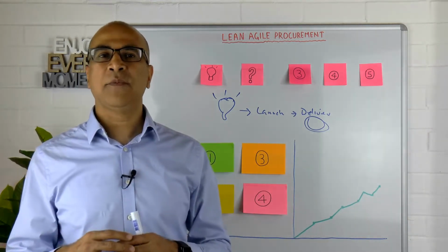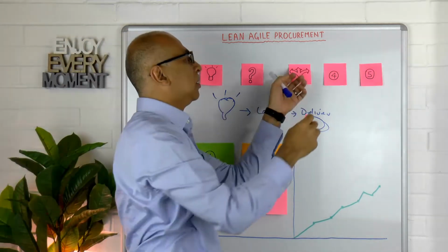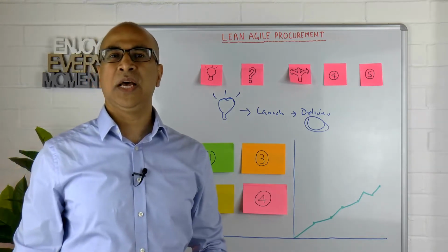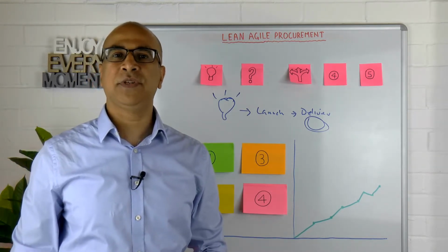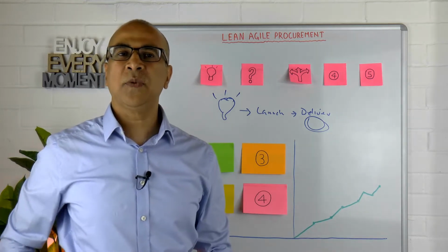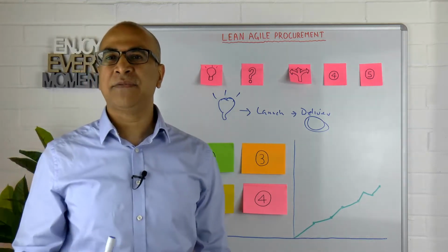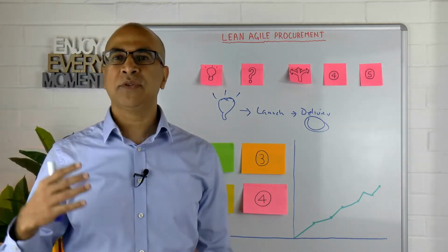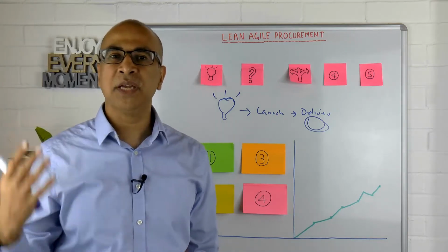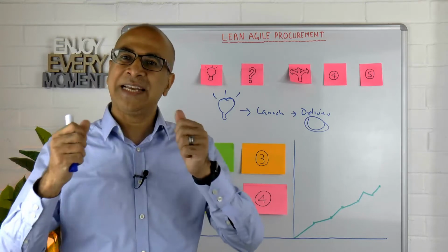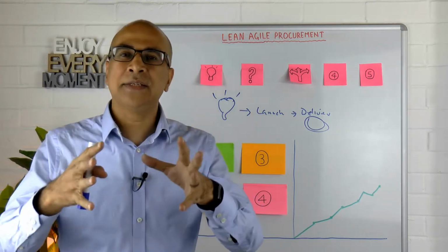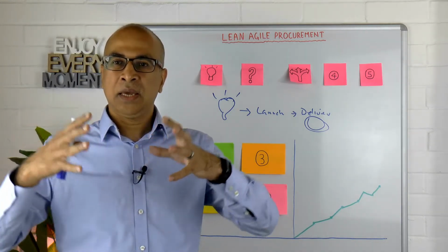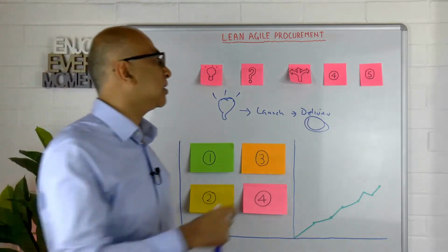The next step is to clarify what potential options for good solutions are out there, and we might do that from a list of different suppliers as well. So this is where we're trying to identify and reach out to different suppliers. Sometimes it's called an RFI, which is a request for information. Here you're testing the field, seeing what the latest understanding is, what kinds of solutions are out there, and who the suppliers are that are playing in this space. Okay, so that's number 3.